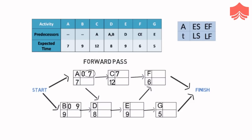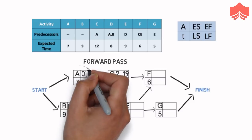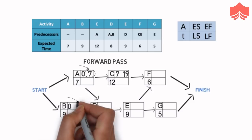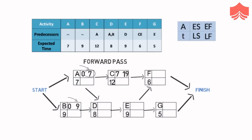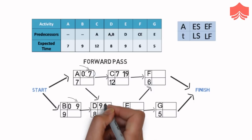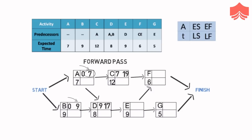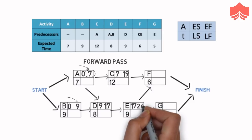After these 7 days, C will take 12 days to complete, and therefore the earliest finish time of C will be 12 plus 7 equals 19. D needs both A and B to finish first. A has the earliest finish time of 7 days and B has 9 days, so we can say that on day 9 both these activities will be finished. Therefore, earliest start time for D will be 9, and D will finish in 8 plus 9 equals 17 days. E has only D as its predecessor, so it can start as soon as D ends. After going on for 9 days, it will end on the 26th day of the project.